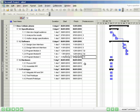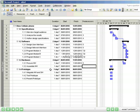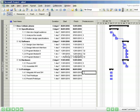Before we can procure the hardware, we need to have authored the design specifications, so I'll put a 5 in that column. Before we can assemble the hardware, I need to have procured it — that's 13. Before I can integrate the hardware and software, I need to have assembled the hardware — 14. And I need to have completed the programming of Module A, B, and C — that's 9, 10, and 11.